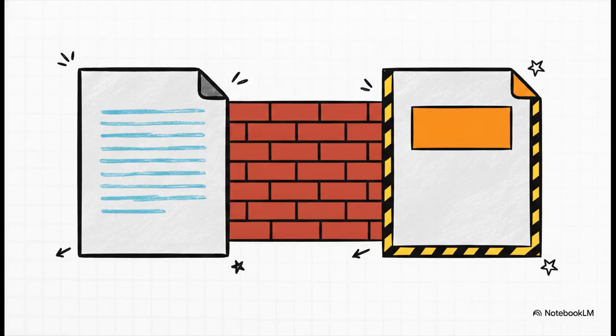We are now tackling one of the most embarrassing pitfalls in LMS builds, developers accidentally pasting your internal instructions straight into the final learner-facing course. Yep, it happens all the time. You have to explicitly tag developer instructions to eliminate literally all the guesswork. If you just scribble notes in the margins or use a slightly different font color, it's going to get missed. You absolutely must use a consistent, unmissable label, like typing Builder Note in all caps, so those implementation directions never ever end up in front of your learners.